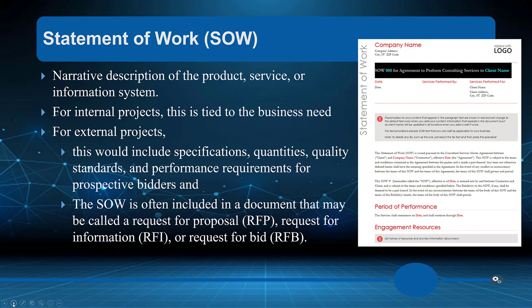Everything comes back to why we're doing the project — to somehow make money for the organization, whether by increasing revenue or decreasing expenses. Remember, expenses can include time; if we reduce a business process by reducing its time, we're essentially making money for the customer. A Statement of Work is a narrative description of the product, service, or information system as a whole. When we break the project into manageable packages with milestones, we'll want a narrative of each package detailing what's delivered, when, and what resources are needed.